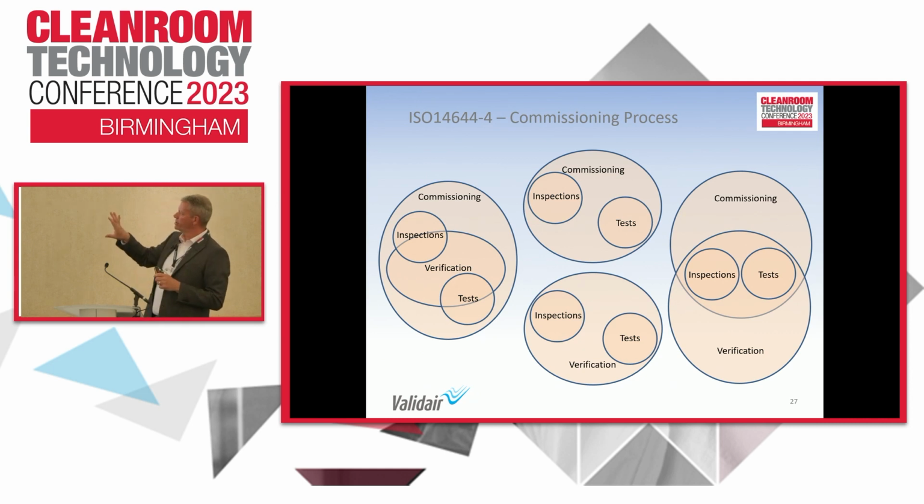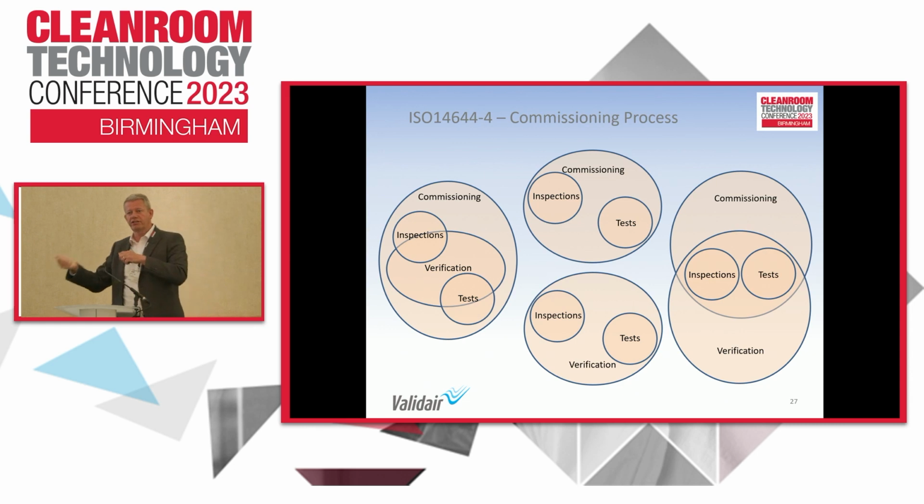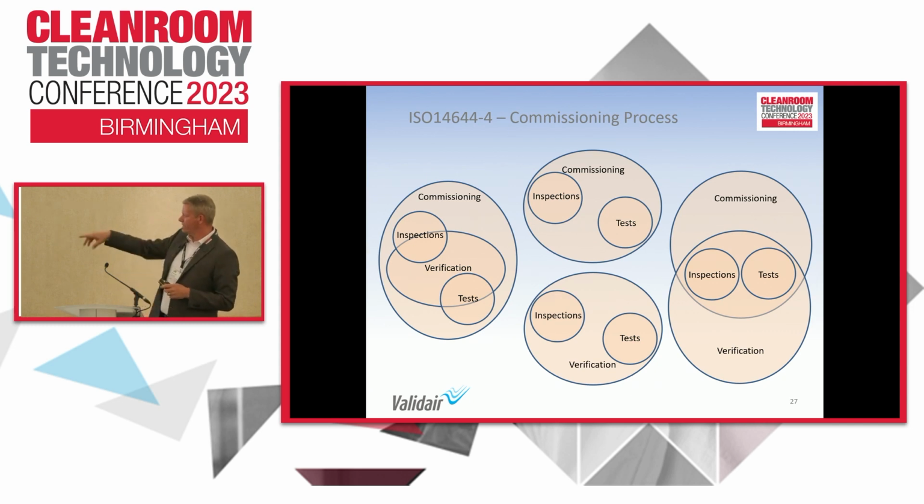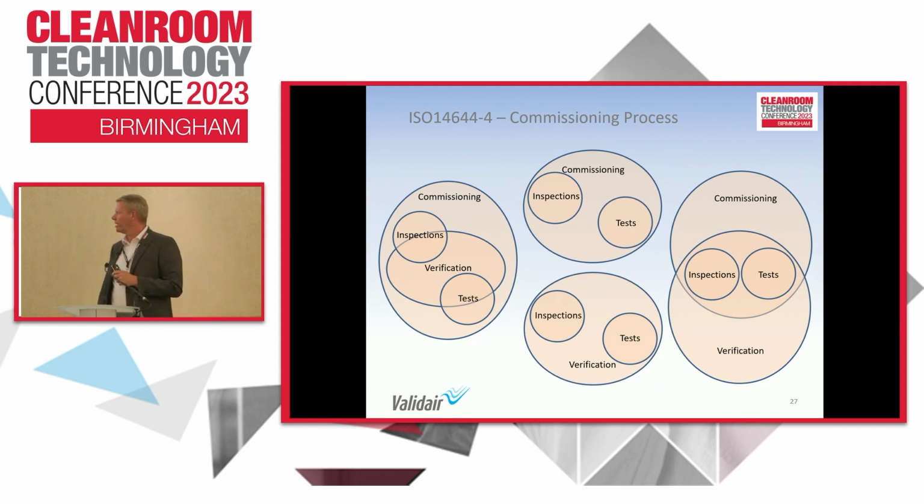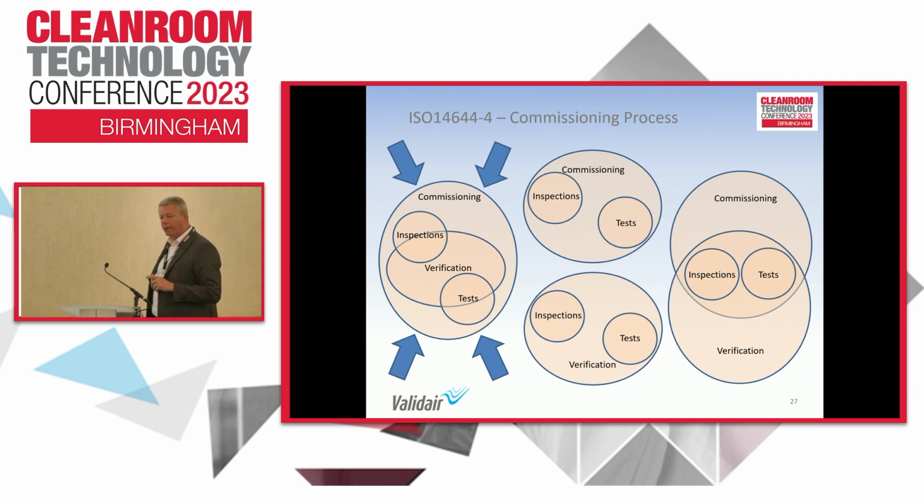Other people look at commissioning and go, well, you have commissioning as a separate period, which is your testing and adjusting and getting it set up, and then you have your verification as a completely separate function. That tends to be a little bit like what we do in pharma, and probably also the third one where there's a bit of an overlap. So some of the commissioning information becomes part of your verification or your qualification. So those two. But what's important is in 14644 Part 4, it's that one.